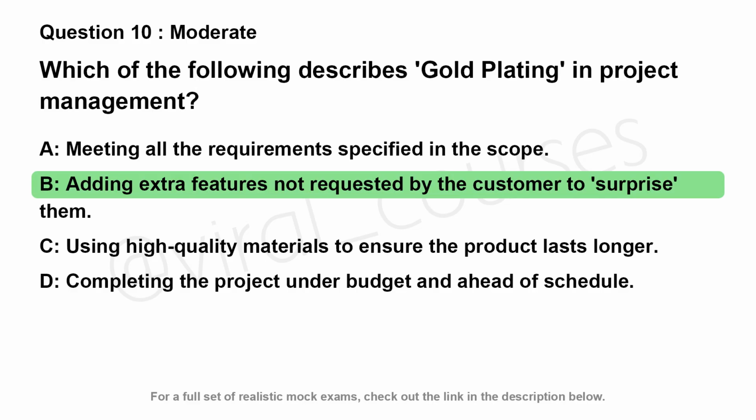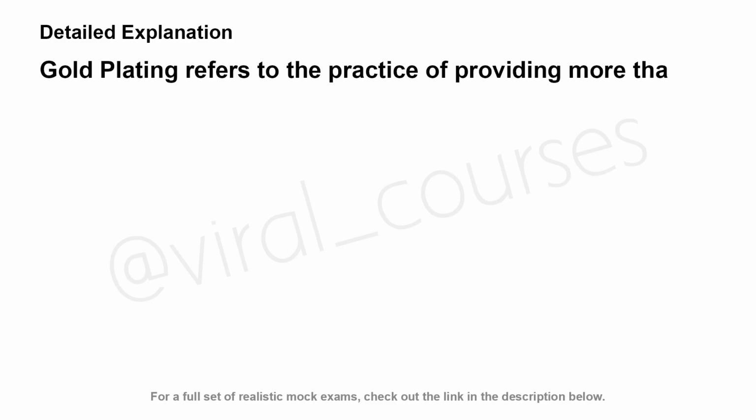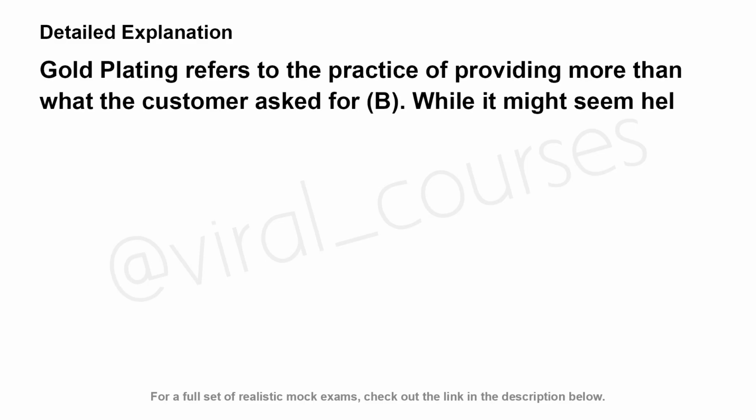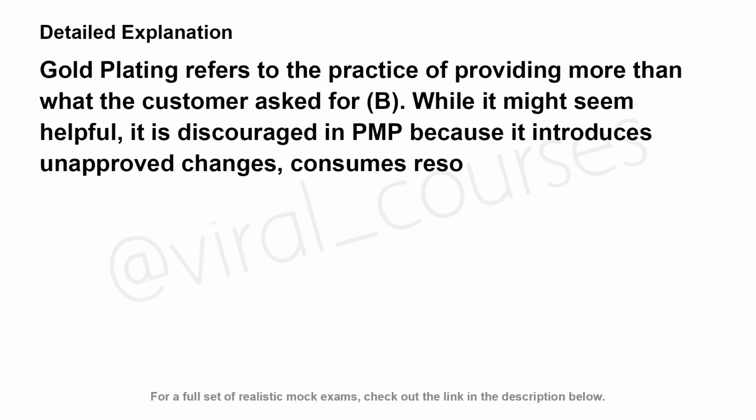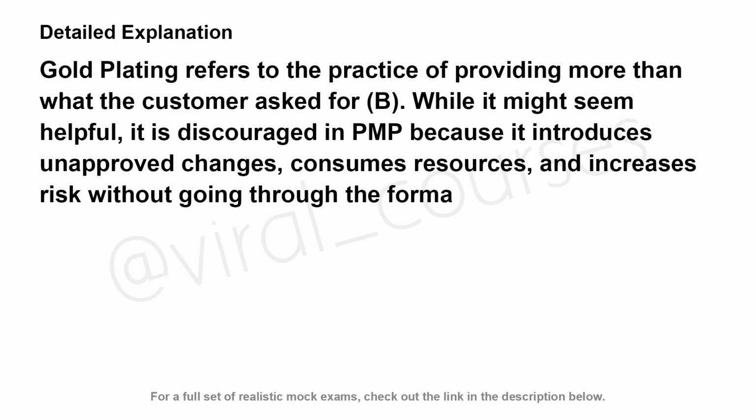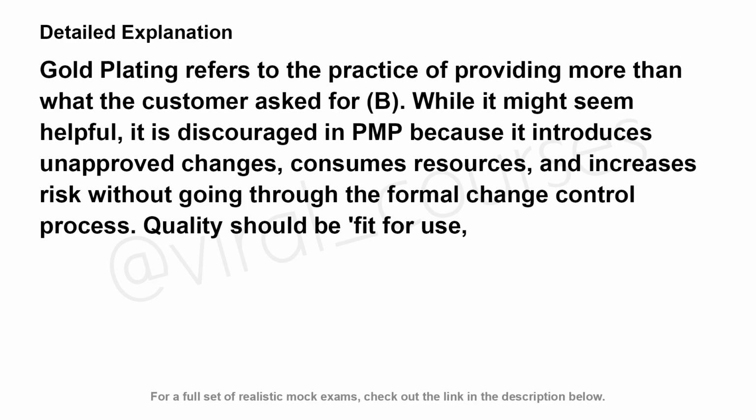The correct answer is B. Gold plating refers to the practice of providing more than what the customer asked for. B. While it might seem helpful, it is discouraged in PMP because it introduces unapproved changes, consumes resources, and increases risk without going through the formal change control process. Quality should be fit for use, not extra features.